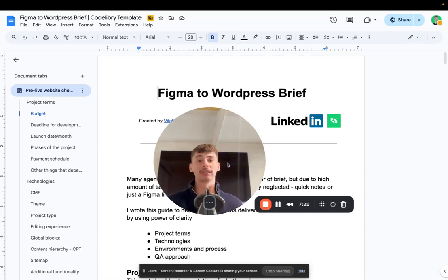In terms of website development, the team will spend roughly 2 weeks on development, 1 week on quality assurance, and then share a very good project with you. But I have rarely met a project without any QA, any revisions from the client. I don't know how to explain this. You can do an amazing job, but without knowing the full scope of work, the full range of agreements between the agency and the client, you won't be able to just deliver and forget.